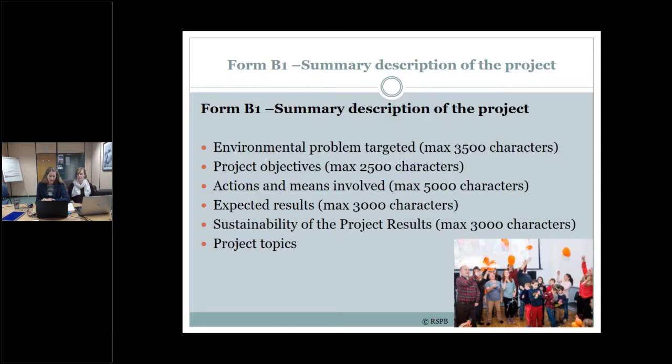Oh, no, going back. Within the expected results, you have 3,000 characters. And in this section, you have to address what is the outcome of addressing each cause of the problem. Again, please quantify any improvements to help determine value for money. Expected results should not be project objectives, so they're different from the project objectives, but they should be the outputs and quantified achievements, allowing the project to reach its objectives. These must be concrete, realistic, and quantified as far as possible. You will need to start to think about how you will verify these projects. So please think about what indicators you will use.